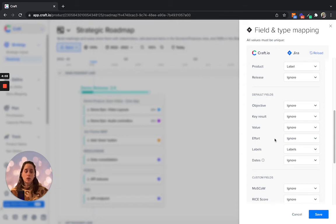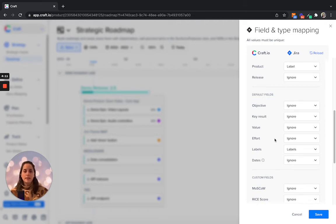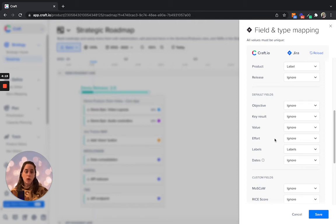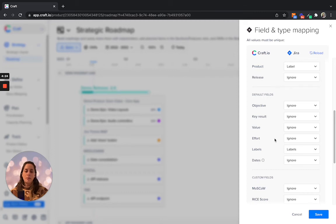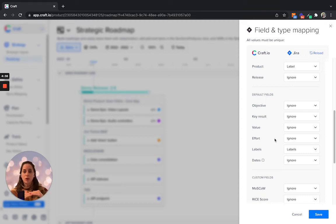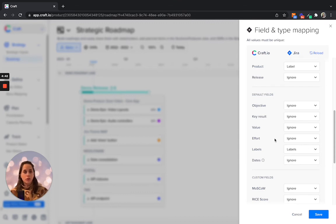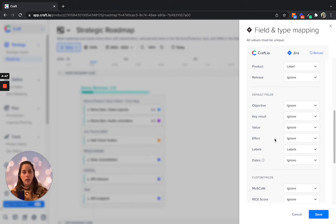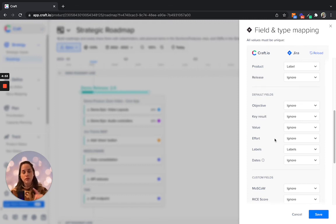What's important to mention, and that's applicable for any kind of field that you want to map across, is that the field type must be identical between the two tools. Meaning, if you want to map a numerical field in Jira to craft, you must create a numerical custom field in craft in order to be able to create that connection and link these two across. Same goes for a single selection field or a free text field. In order to map it, we need to have two fields on both ends under the same field type.